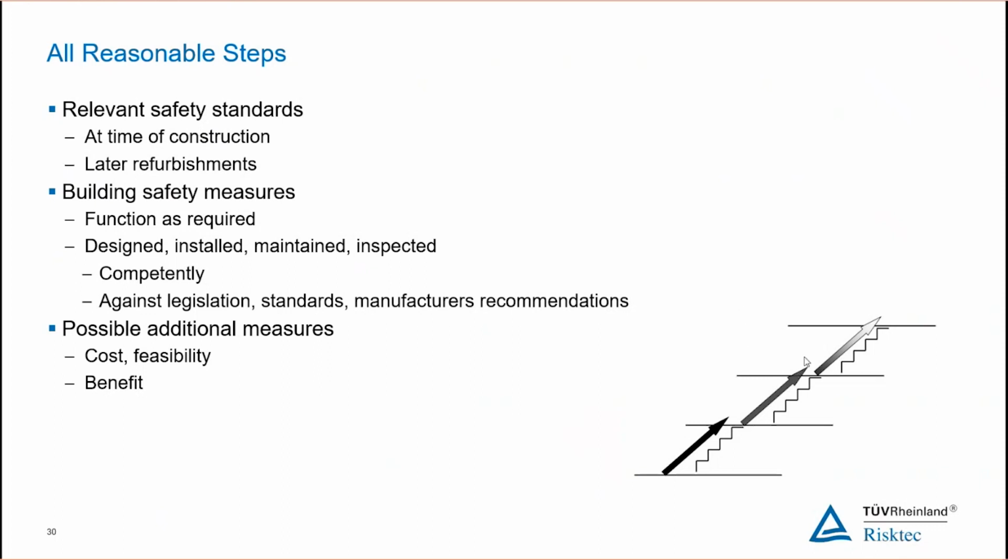But then the building safety measures that we have in place, the engineering controls, the people controls, give us another layer that we have to go up and check. Are we doing that? Are they designed, installed, maintained, and inspected by competent persons? And do they meet the manufacturer's recommendations? Are they meeting the standards that we expect them to put in place?